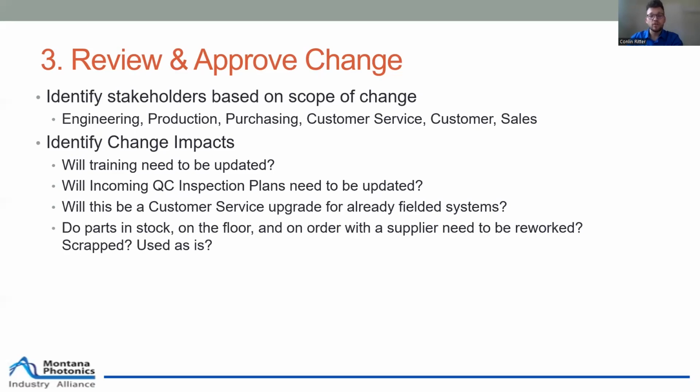When you're making a change to mechanical components, you also have to think about the parts that you already have on the floor, the parts you have in stock, the parts you have on order with a supplier. Will those be able to be used as is, or will you be able to rework them, or will they have to be scrapped out?